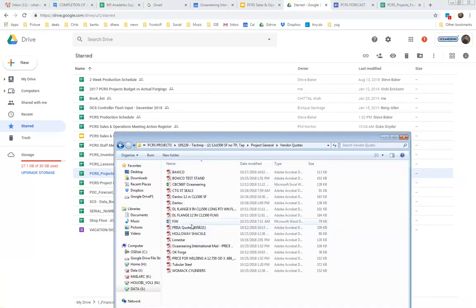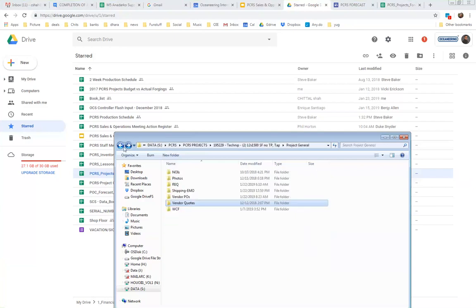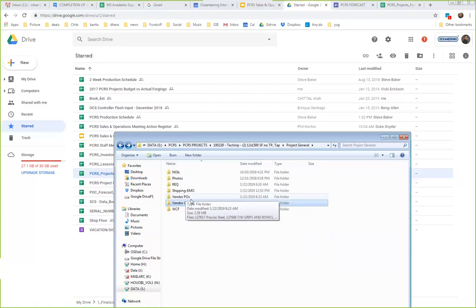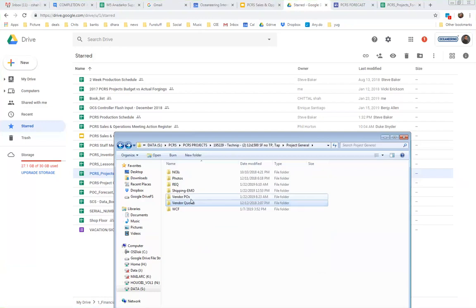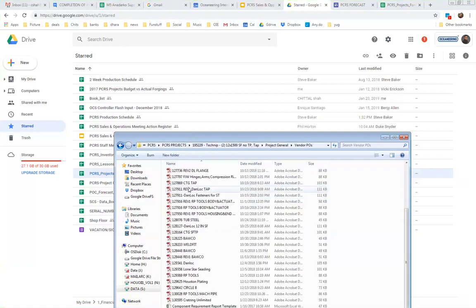Once the BOMs are released, you'll basically say, hey, go and buy the parts. They'll get a couple of quotes and say, I think this is the best one. Then they will send a requisition to you with those quotes attached saying, Mr. PM, I want to cut a PO to this part. And you will approve it. Once you approve, they become POs, and POs stay in here.